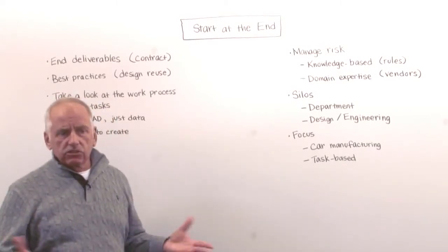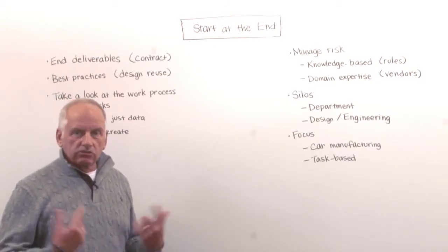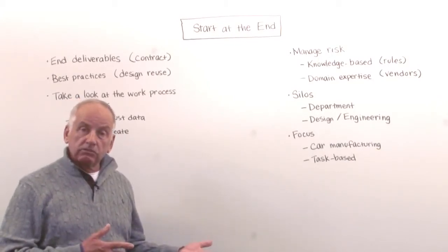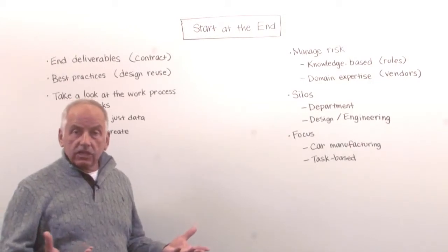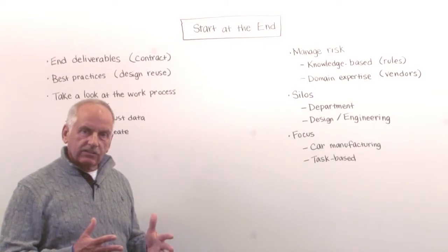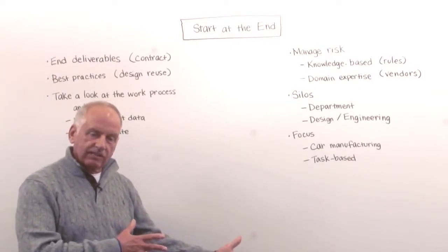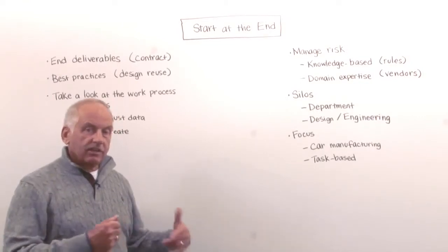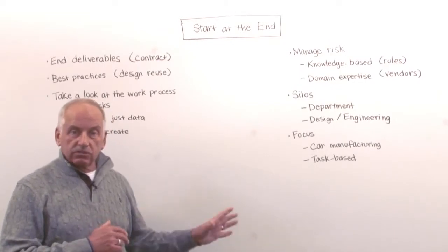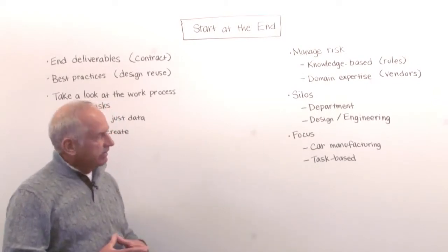Now the other thing is about design expertise. Of course, everybody like yourself has a lot of expertise in doing certain things, but to manage risk, it's also good to understand what type of vendors you may have in this project. For instance, if you have an automation vendor, all plants these days have automation vendors for DCS systems. Maybe it's good upfront to understand what part of the scope of work you can actually leave to the MAC, the main automation contractor. He has the expertise. He has the people, so maybe it will offset some of the work, but also some of the risk, because they do that and you don't have to worry about it. You don't have to do everything. So that's maybe another thing.